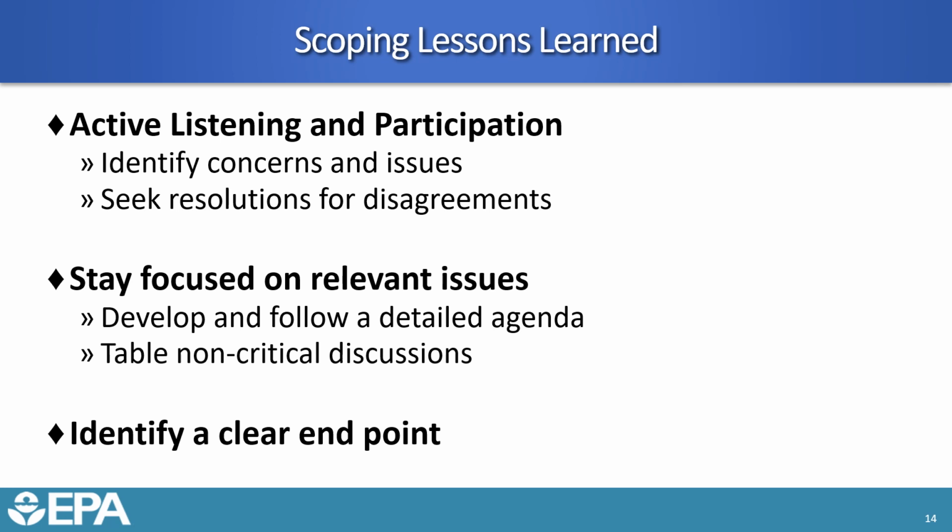Another point is to stay focused on relevant issues. To do so, it's important to develop and follow a detailed agenda and to have a parking lot to table those non-critical discussions, because there is a tendency to meander or get off topic. It can be a real challenge to stay focused on what the issues are.